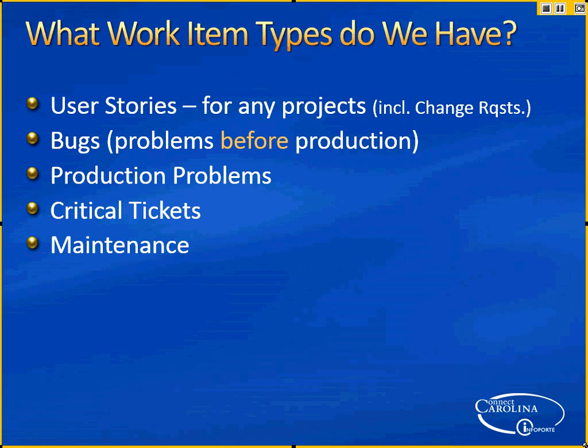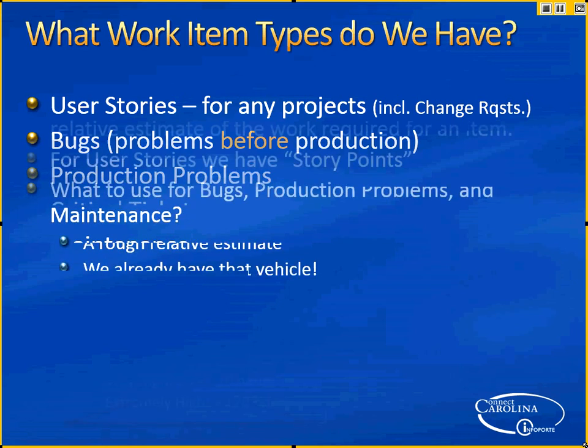So how do we account for those other types of work that we might say are outside the Kanban process? That needs to be a decision made collectively. Some of the more variable work should be pushed into here. But that's a fixed thing. If every Monday morning someone spends an hour looking at the batch jobs from the previous week, that's not something you can push in here. It's something we can account for by saying she doesn't have as much time available as somebody else because of that. Exactly. That's my thought. We can talk more as a group about how we would do it, but that seems reasonable.